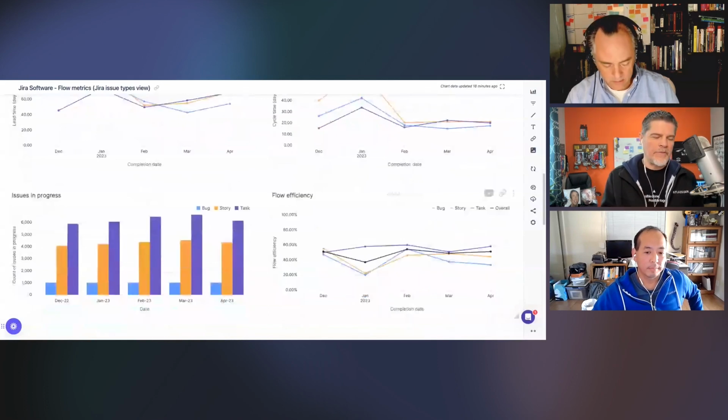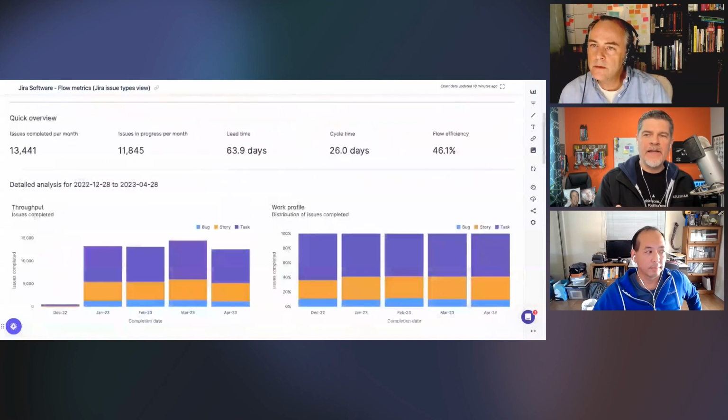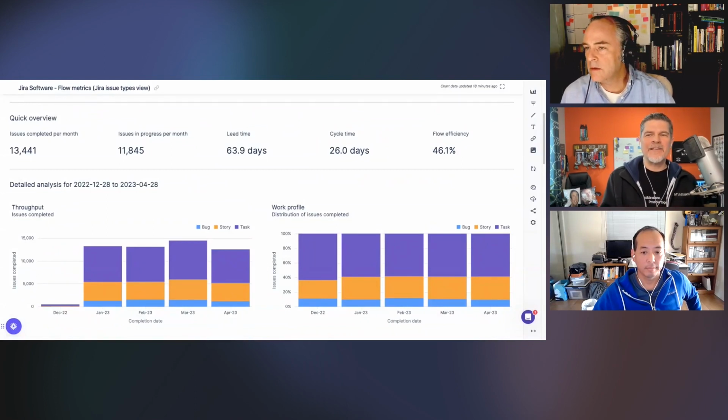Okay. So if we step back and think about those flow metrics, what we're looking at is, what is the average lead time of a team? What is the average throughput rate of that team? Given that the work has the same size and complexity as past work, then within a reasonable confidence we should be able to predict an average time. I hate to say average, because there's always the flaw of averages, but we make certain assumptions: if they have standardized work, or if we have a rubric, we can compare this work to other work and see what past performance tells us.